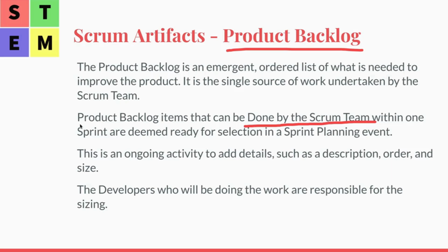Okay, so for example, from the very beginning, I can see that the acceptance criteria is missing there. So once we get acceptance criteria, then the Scrum team needs to evaluate the effort. Okay, so how much working effort do we need to have this product backlog item done?